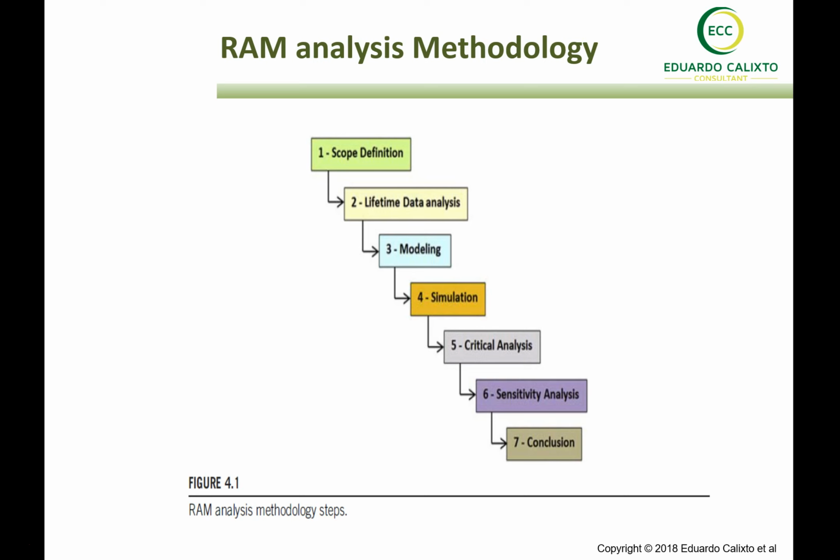On the other hand, we need to be aware, for example, when we carry out the design phase, maybe the system changed the configuration, maybe an equipment type is modified during the design, and we need to update our RAM model. But that's not changing the scope, that's changing the design. That's a huge difference. And then, of course, the engineers and project managers understand that the result will change. Okay, so let's pay attention to the scope definition, that's very important.